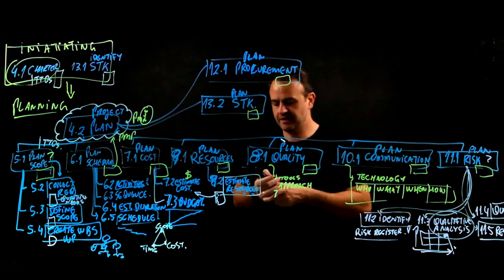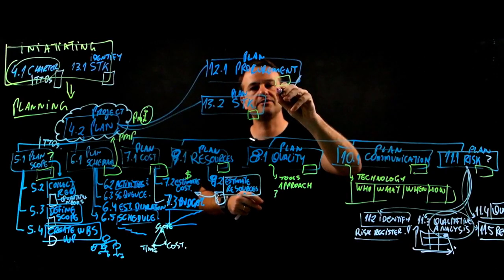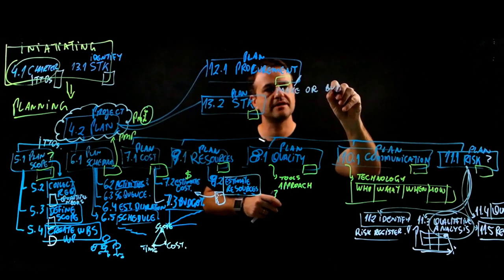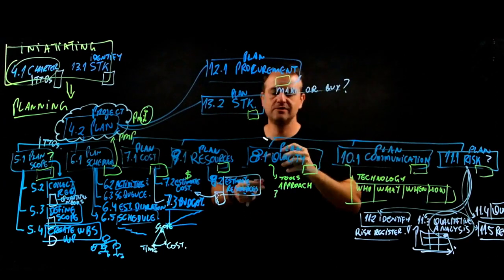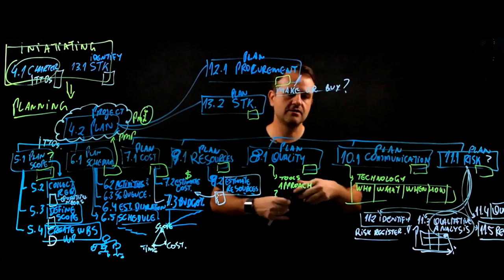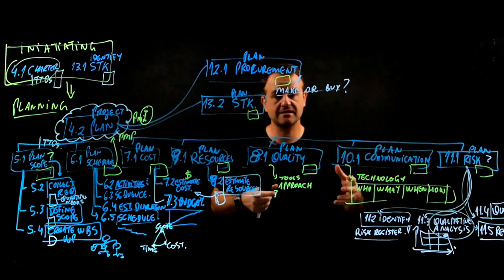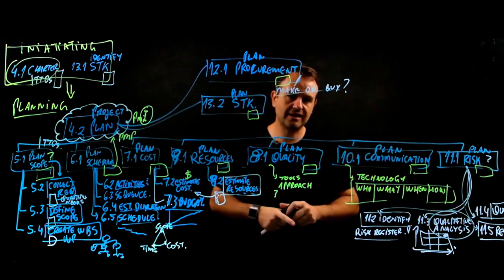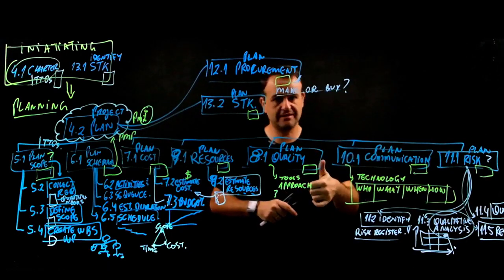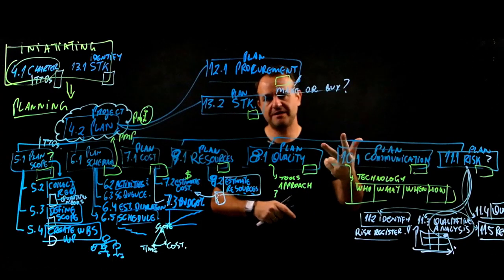All right? So in the procurement, we also have only a single process here. We are going to have make or buy decisions here. Make or buy decisions. And then you are going to include the processes so that you can conduct procurement during the execution. So maybe in your organization you need a statement of work for different work packages in the WBS. You have a contract template, you have any other information, this will go into procurement. So roles and responsibilities related to procurement. What are the processes? If you have any legal aspects you should be aware of.